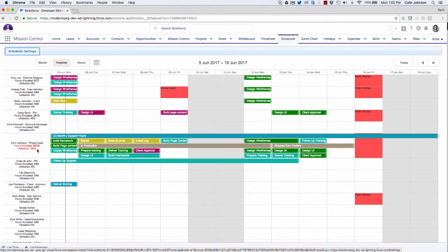So what this is showing me is I've got 86 hours over a 58-hour availability. So it's flagged up red that I'm overutilized, therefore it's letting me know that there's a bottleneck on me as a resource. So what I'm able to do is actually drag and drop this work off to other people to make sure it's not going to be bottlenecked because of me.